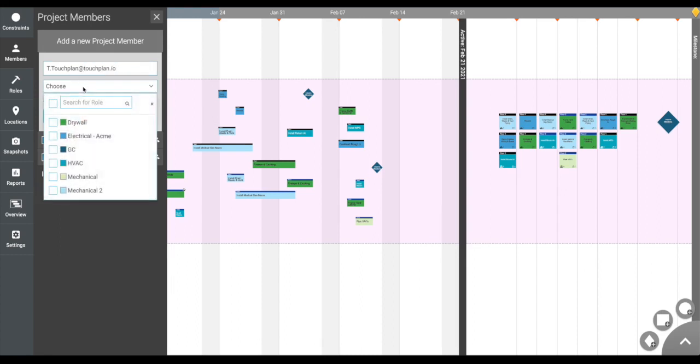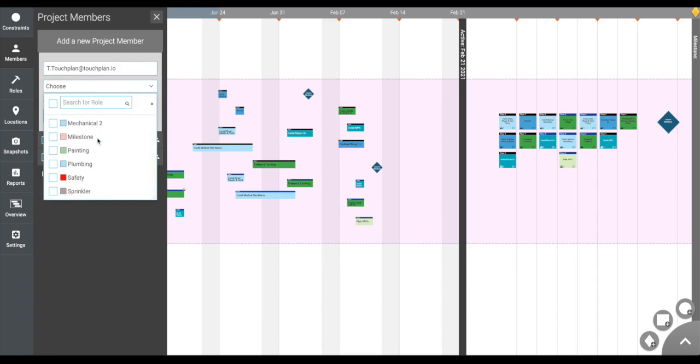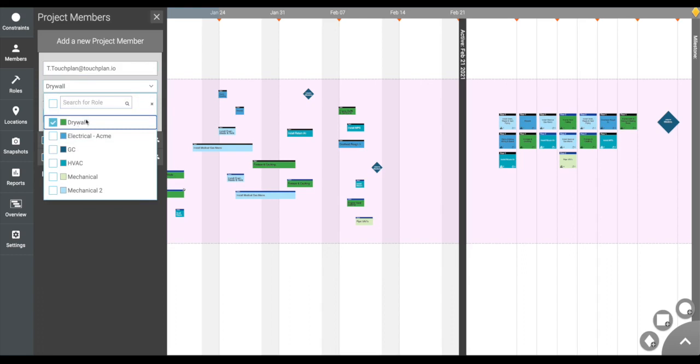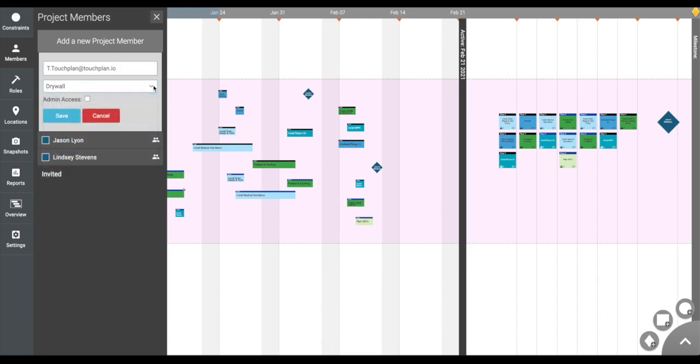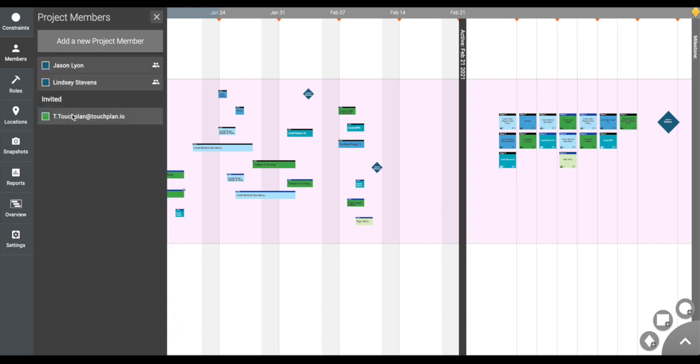Roles can be customized on the left-hand side beneath where it says Members. Check the admin box for anyone on the project who would be facilitating planning sessions using TouchPlan. Typically, general contractor project team members would be listed as admin users.